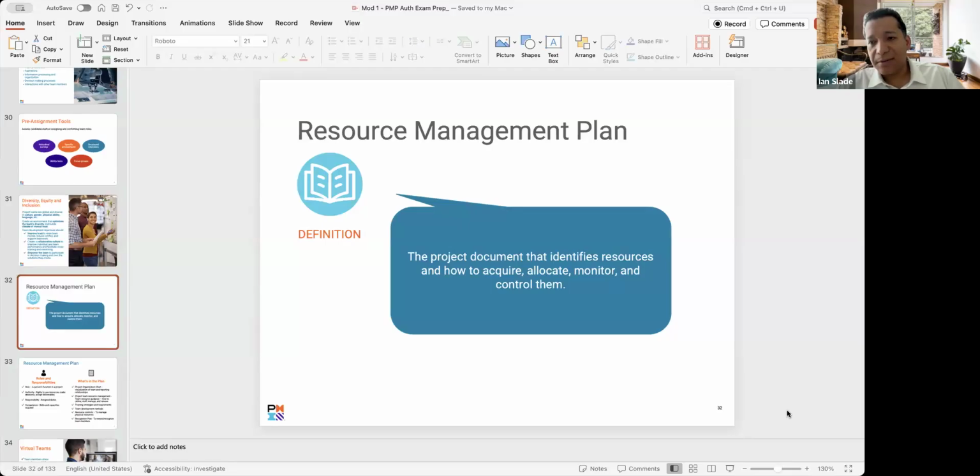So for the retirement party, the person retiring is a stakeholder, of course. Maybe some family and close friends that you might want to invite, maybe the department employees of that retiree, right? So you're inviting them, but you're not necessarily assigning them to tasks. Does that make sense? So the key difference between the resource plan and the stakeholder register is task.